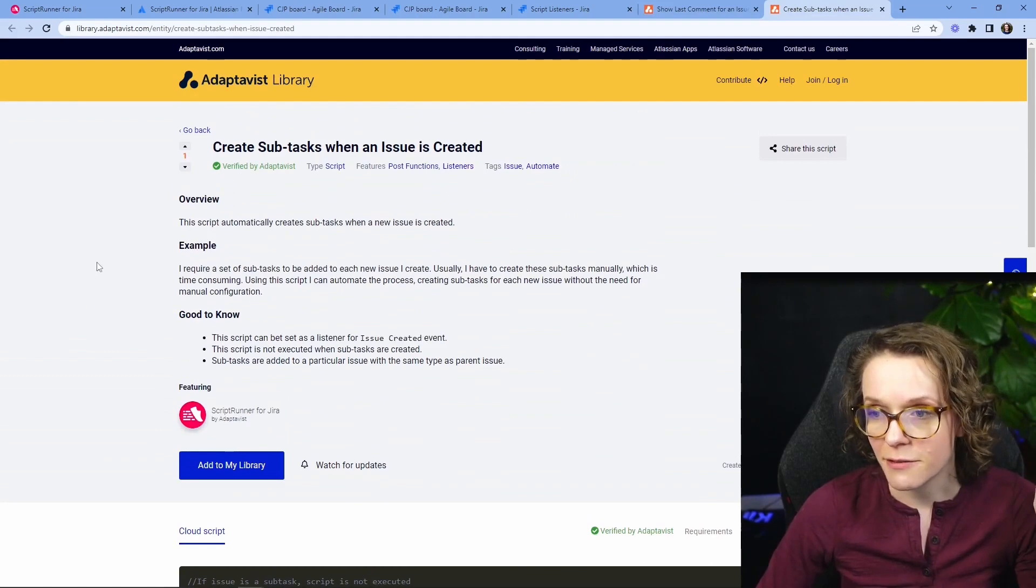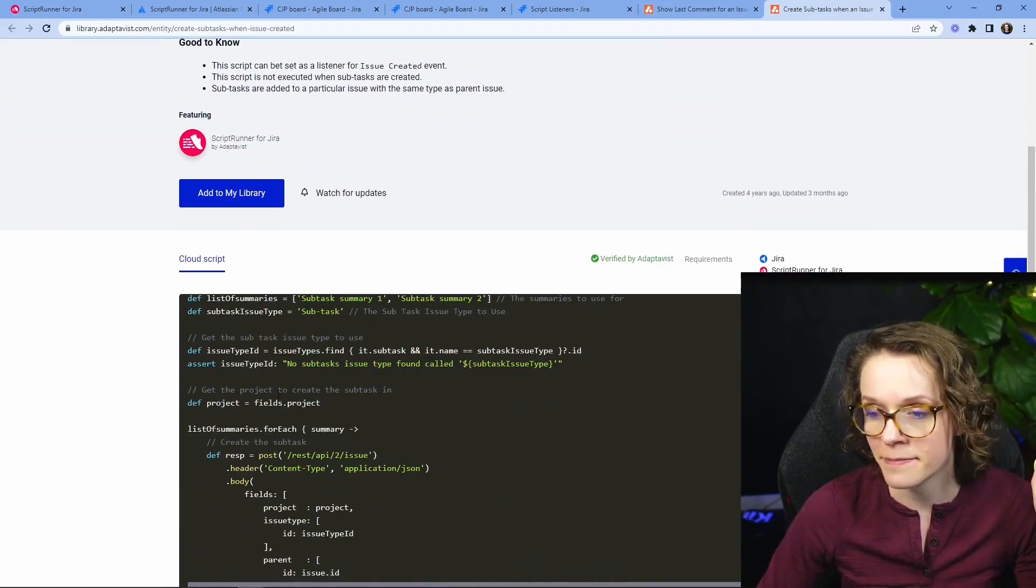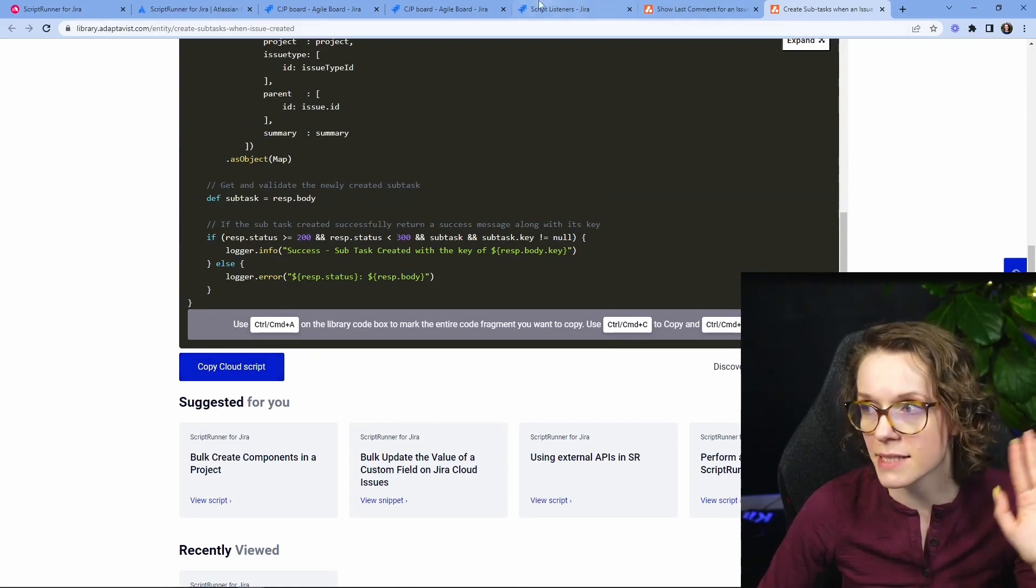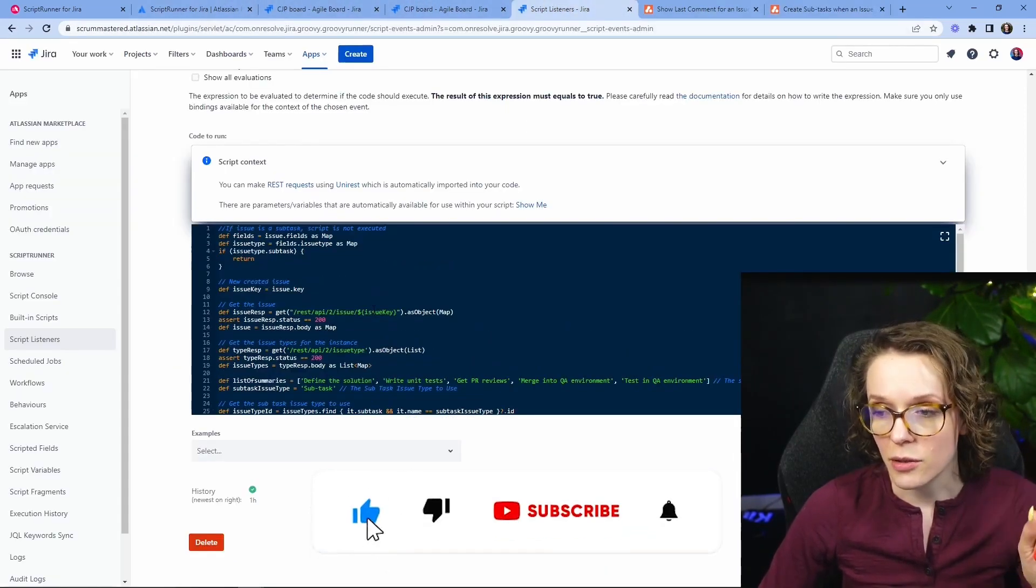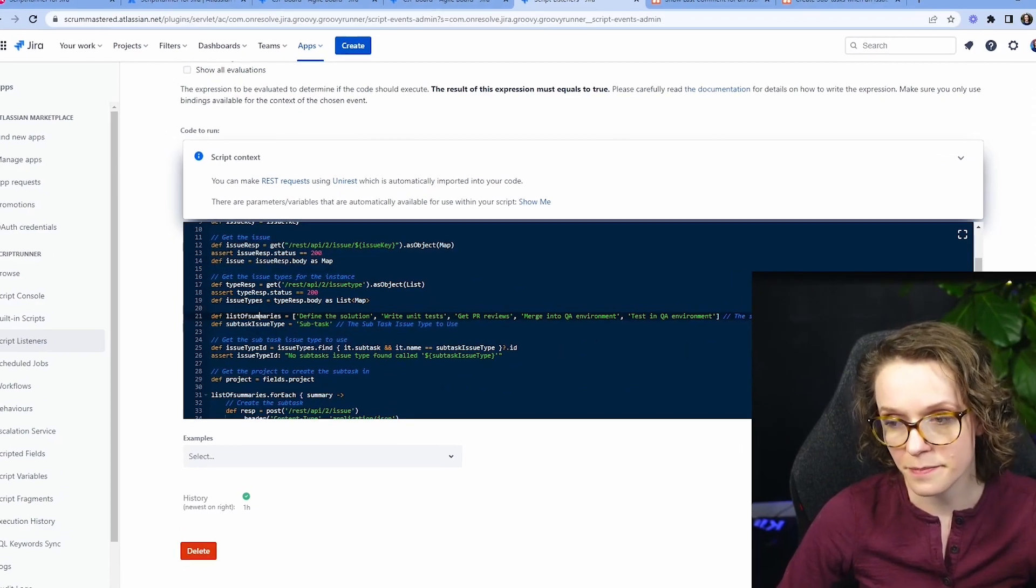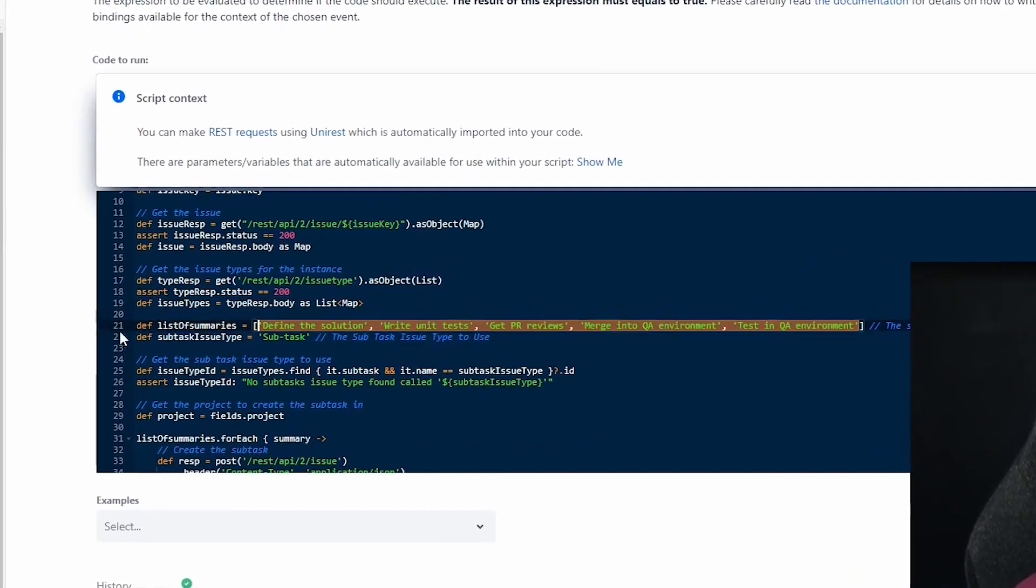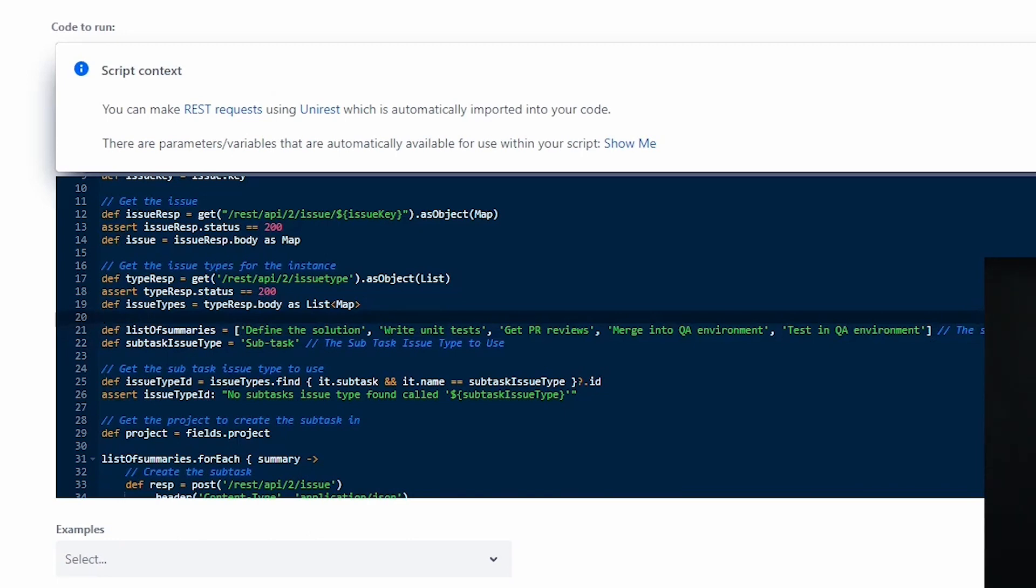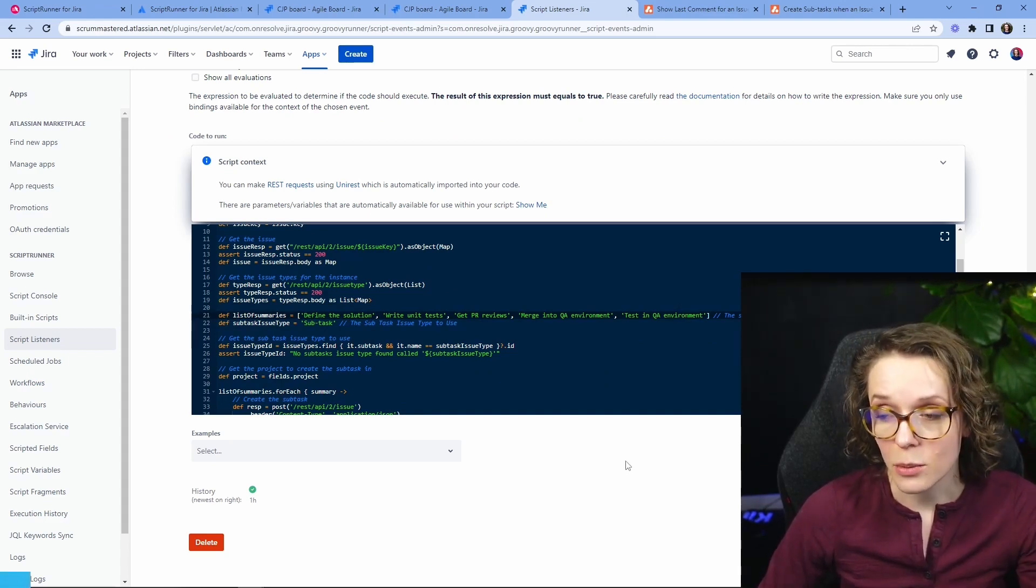I took specifically this one create subtasks when issues created just came in here copy paste and then went back into the script runner and then the only thing that I did actually change if you go in here and you have list of summaries in line 21 is I have identified what subtasks I want to create right so I have five subtasks define the solution write unit test get the PR reviews merge into your environment and test into your environment.